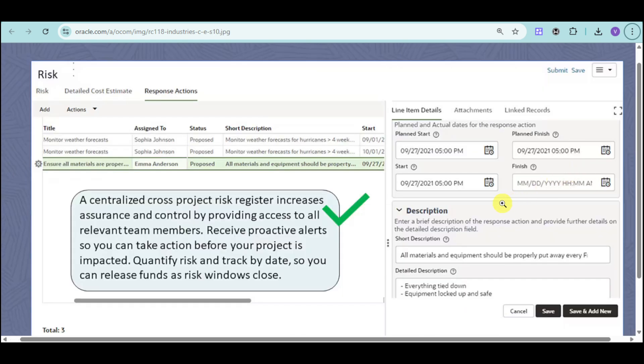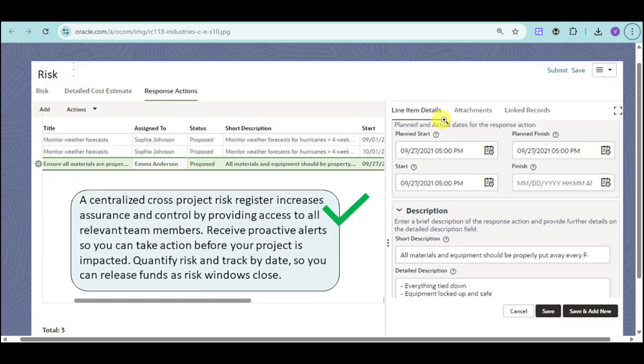We also have the risks that have been added. You can see the risks that have been detected, and you can choose the response action for that particular risk. You can see the line item details, attachments, linked records for that, description for that particular risk. You can save that particular risk and then address them in order to increase insurance and control by providing access to all relevant team members. You can quantify risks and track them by date, so you can release funds as risk windows close.